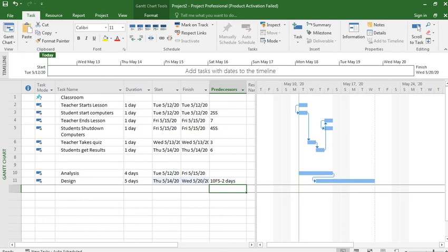If you want to start the process before 2 days, put the minus. If you want to start the next process after 2 days, after 3 days, after 10 days, due to some problem, maybe due to vacation, or rain during a construction project, you can use lead and lags.